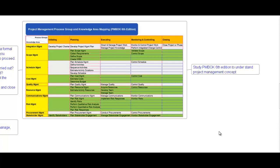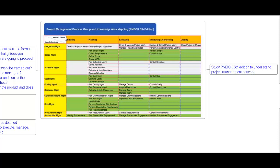Please study PMBOK 6th edition to understand project management concepts. Under PMBOK 6th edition there are five process groups and ten knowledge areas. The process groups are: initiating, planning, executing, monitoring and controlling, and closing. Any project goes through these five phases. The knowledge areas are: integration management, scope management, schedule management, cost management, quality management, resource management, communication management, risk management, procurement management, and stakeholder management. Under the initiation phase, the project charter is created and stakeholders are identified.